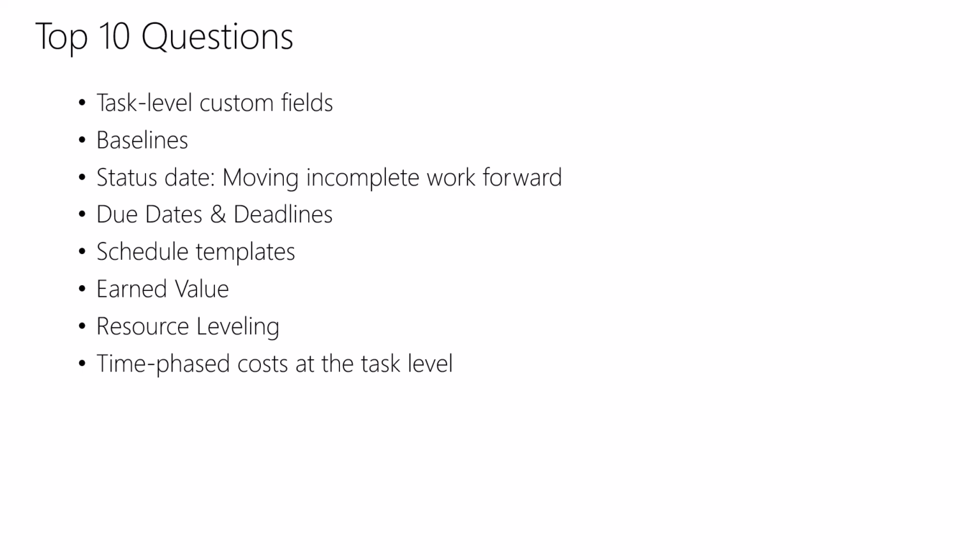All right. Many organizations that we've worked with use the Project Online timesheet in dual entry mode so that it also statuses the schedule. Yeah. Well, you do have the option of doing timesheets on the Power Platform and in Sensei IQ, but to status the schedule, you'll need to go with Project Server again.